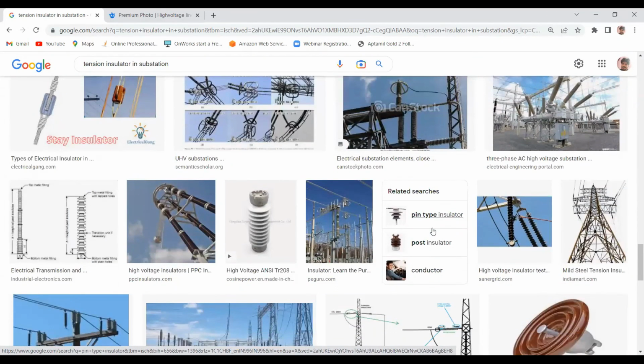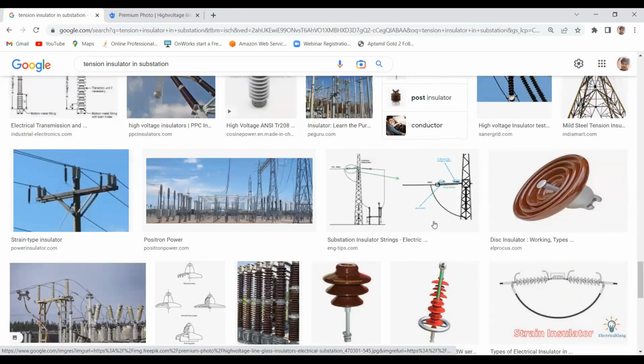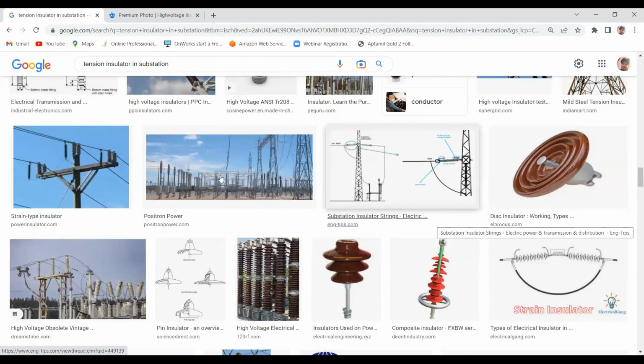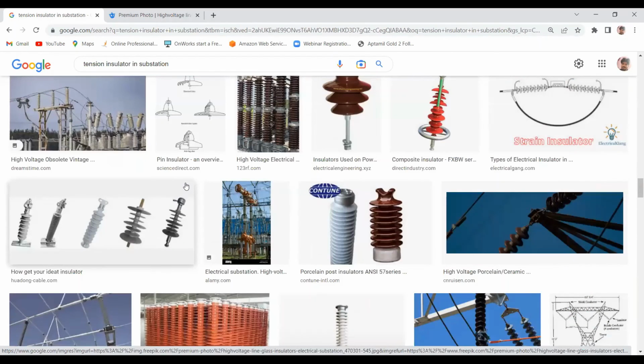If you are changing the conductor, please be cautious that the clamps and connectors also will change. If you're not changing that, it will affect your project timelines at last, because those are small equipment. Generally we will not bother on this. Those will be in the store.